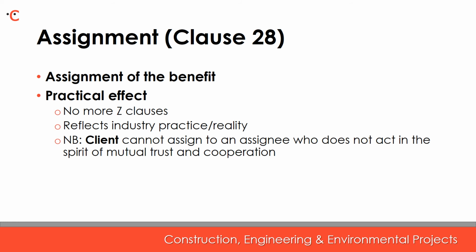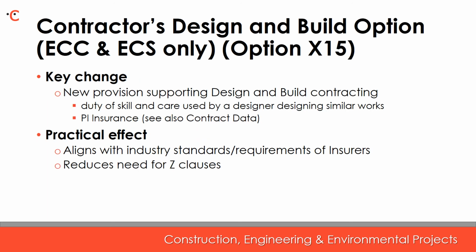We would note that Clause 10.1, as it was, has now been separated into two clauses. However, NEC have said this will not change the effect of the provision. The client cannot transfer the benefit of the contract to an assignee who does not intend to act in the spirit of mutual trust and cooperation, thereby reflecting the NEC philosophy. It's not clear why this doesn't apply equally to the contractor.